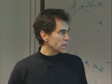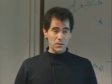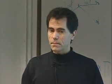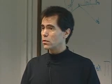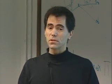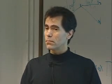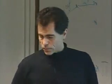So we had really the key to success is developing 3 different types of metrology measurements that are independent, that allow you to cross-check, because you're talking about things that you've never built before and you're pushing the state of the art and you don't know how to measure it. The key there for an engineer should say, okay, I need not just one way of checking my work, but I need at least 2 ways and preferably 3 independent ways of making sure that I'm doing the right thing. So when you're pushing the state of the art, a good lesson is try and get into a position where you've got more than one independent check of your analysis to make sure it's correct. So that was a very big challenge for us.